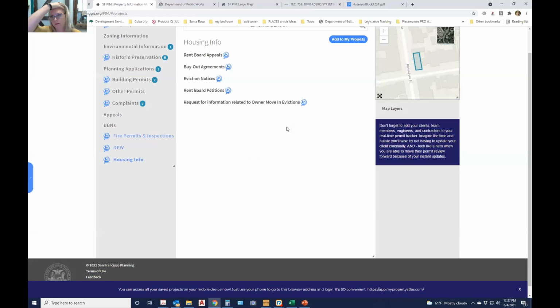So I'm generally in favor, especially since I get a lot of calls from real estate people saying, my client's in contract on this property and we need to know these things right now. I will tell them, go to the rent board and do the research before you close escrow, because they can really derail projects. So this is really only in here for my property management clients and some of the real estate people I deal with, but every once in a while it is added value I can offer a client to say, this is something you're going to want to look into before you close escrow or before we proceed at all with your project. Like, don't sign my proposal until you've checked the eviction history on your property, because there's no point in us starting work and then there's bad blood because they've started work on something that they can't actually build.